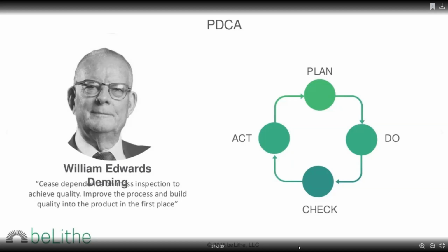That is the acceptance criteria that is appended to the user story ticket. Part of the acceptance criteria is where you can add things like the test cases, because for something to be called accepted and ready to be used, it has to meet the requirements. So when you click on a button, you're supposed to perform a certain task. When I click on enter, it's supposed to move from the home page, or when I hit sign in, I have to go to my user profile and then be able to edit. Or when I click on edit, this is what's supposed to happen. So that becomes the acceptance criteria.